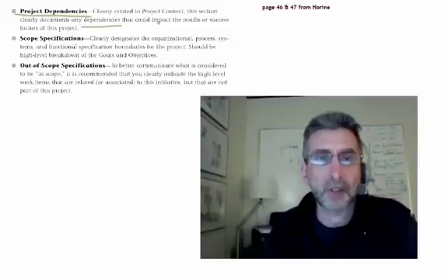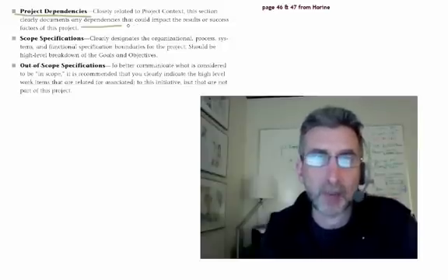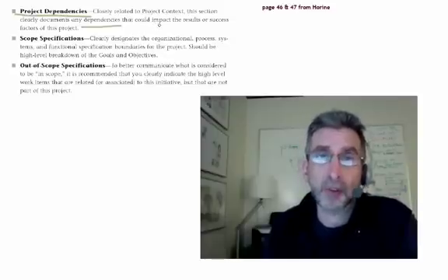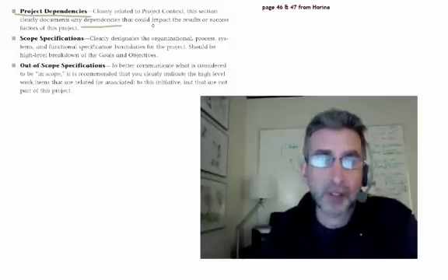For instance, I mentioned earlier that you may be relying on a programmer to help you with some coding. So your project depends on that programmer doing that. So that would be a dependency. And then of course that relates to the risk factors. So all these things interrelate. You could be depending on getting access to an office to do the work in, or access to a studio in order to do some videotaping.